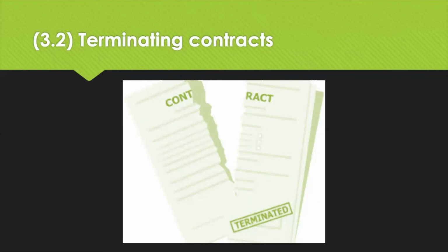Termination clauses may expand or limit the right to terminate a contract, which would normally be given under common law. This needs to be mutually agreed by the parties in advance. This is likely to involve discussions at the negotiation phase that can allow the parties to terminate a contract by mutual consent and mutually agreed actions before the performance of a contract. It may include a fee or may identify specific actions which a party may not do, such as sharing details of costing with a third party. And it's usually included in a term that's reasonable when notice is given.